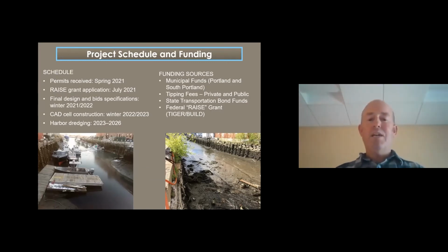The project has a lot of momentum, a lot of support from all the congressional folks and at the city and state level. It's really a win-win project. It needs to get done. These sediments aren't going anywhere by themselves. So everyone's very hopeful. We're working on that application now, which is due in July. As I mentioned, following award of the grant, we'll look at final design and bid specifications in winter 2021-22. CAD cell construction the following winter, followed by harbor dredging after that.